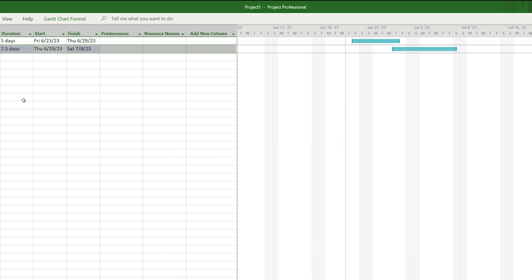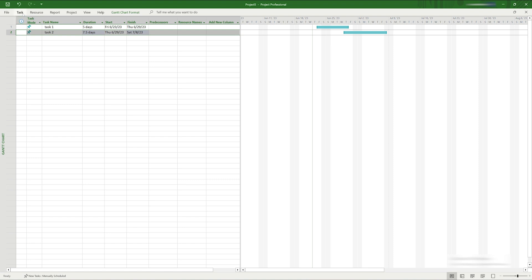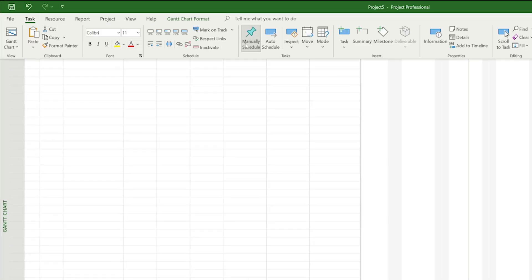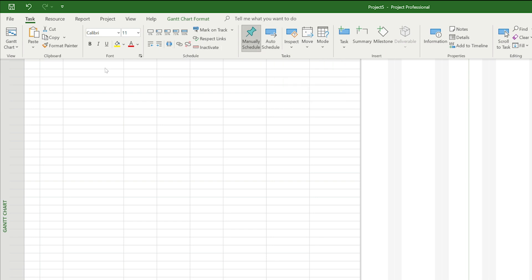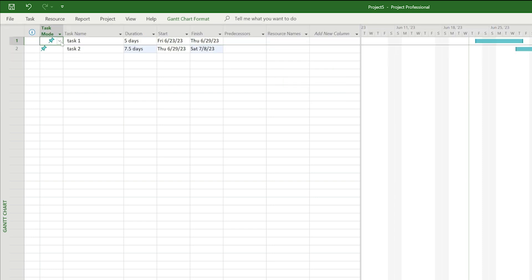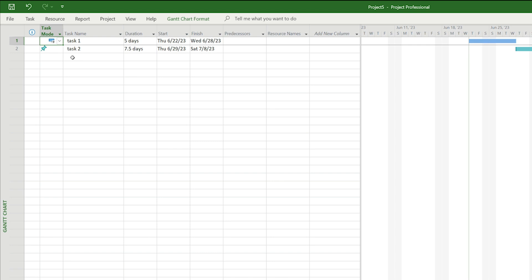Now would be a good time to decide whether you want your tasks to be manually scheduled or auto-scheduled by project. To set the scheduling mode for your whole project, go to the task section in the ribbon and choose manually schedule or auto-schedule. You can change this on a per-task basis by clicking on the blue pushpin icon and selecting manual or auto. The blue pushpin icon indicates the task is manually scheduled; if you select auto-scheduled, the icon changes to a blue box with an arrow.